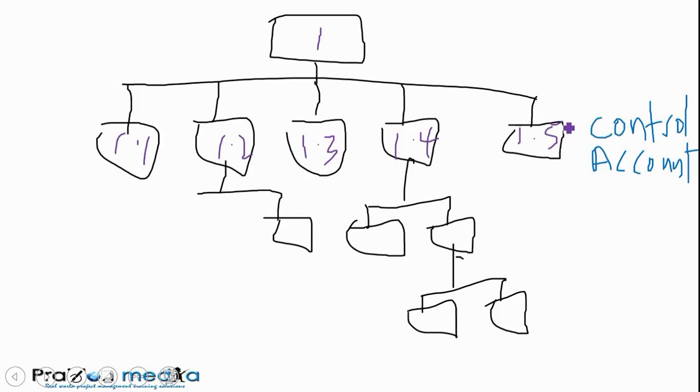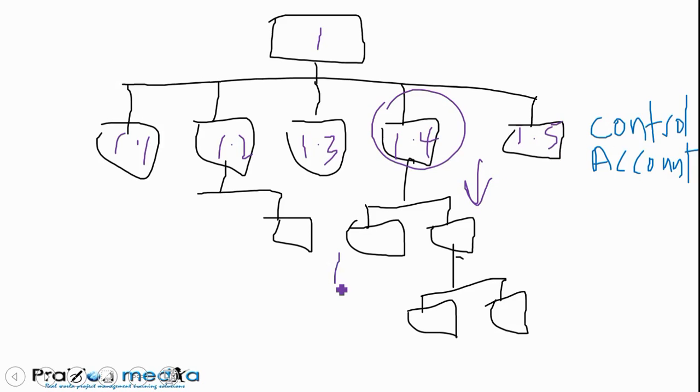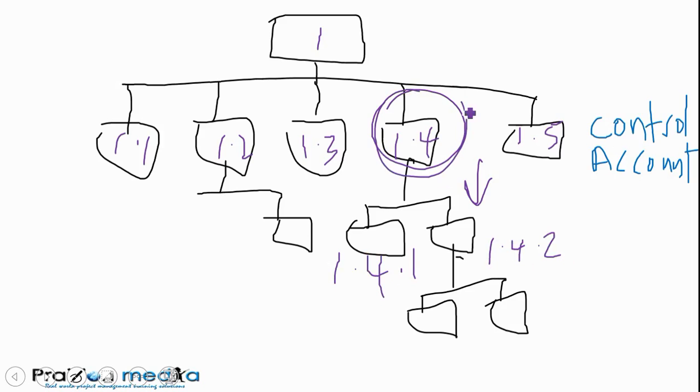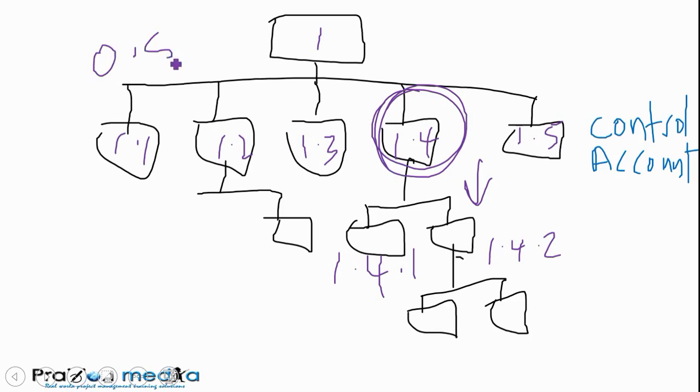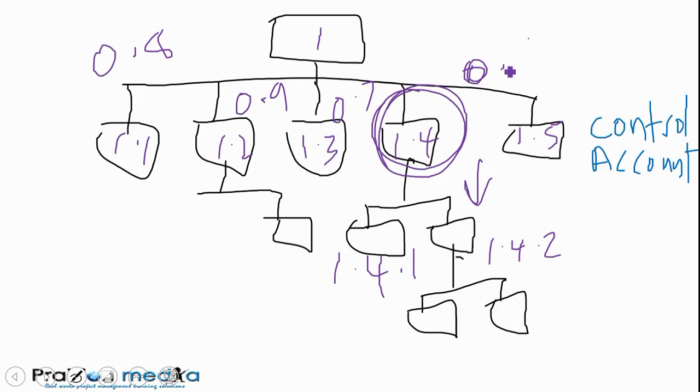If we're working in a firm, 1.4 as a control account is used to track everything happening under it, but in an aggregate fashion. So 1.4.1 and 1.4.2 and anything else that comes under is all tracked right here at 1.4. For that reason, we could determine the earned value performance of 1.1. Say we're taking a look at the cost performance index of 1.1, we could see that's 0.8, we can see this is 0.9, we could see this is 0.7.